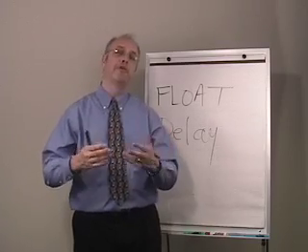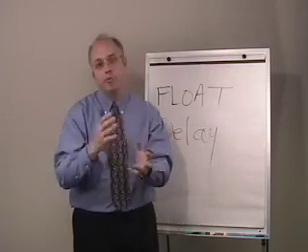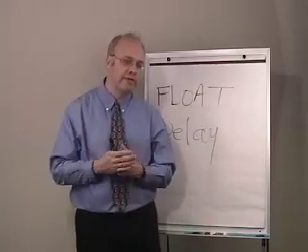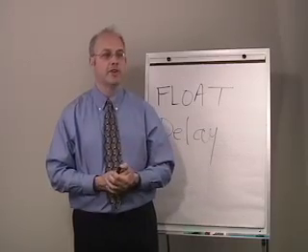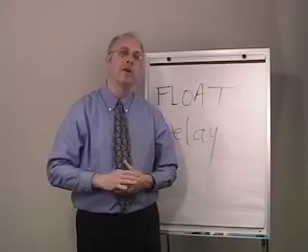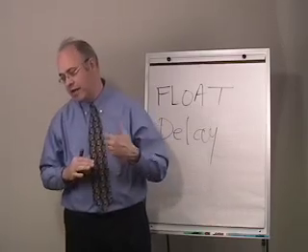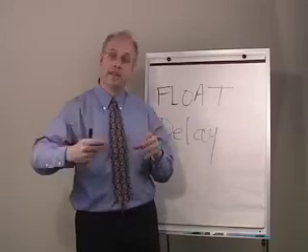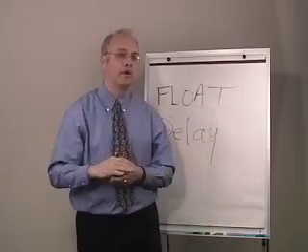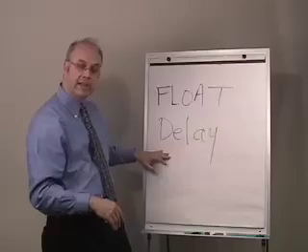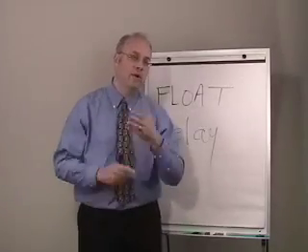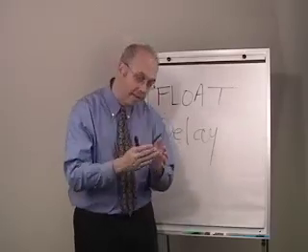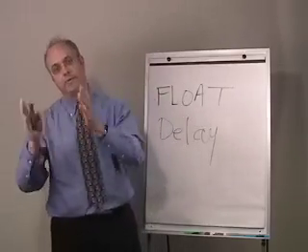When you're looking at float from a perspective of what's happening as the project is progressing, if a critical path of work is delayed, then most likely float is being added to the non-critical work. And if you're accelerating the project, it's likely that float is being consumed and less float is available to all the work on the project. When we're analyzing delay, we're looking to see when the float on a non-critical path is consumed by the delay, and that delay becomes critical and begins delaying the project or intermediate milestone.